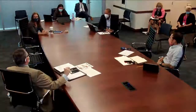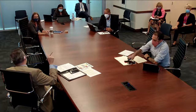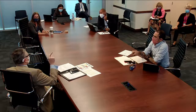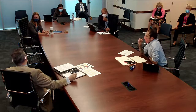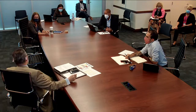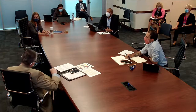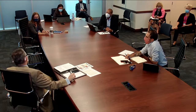Yeah, so the idea, and Cedric had some of the information, but the idea would be to get the project wrapped up and finalized so we can get it out to bid, open up bids at the end of October, and his team can evaluate all the bids and multi-primes, bring back a recommendation at the end of November for board consideration, and then, taking all of that into account, move forward with a planned construction start in January.